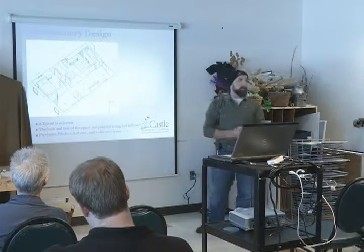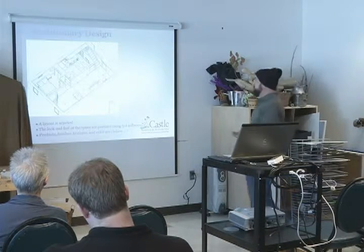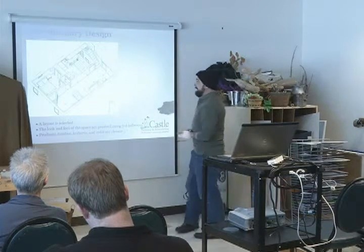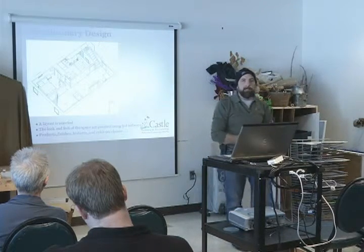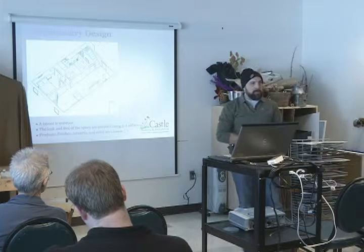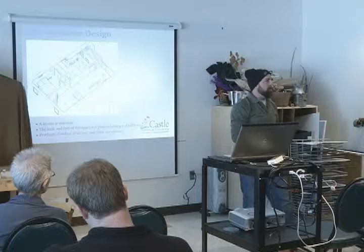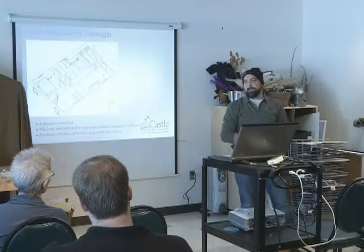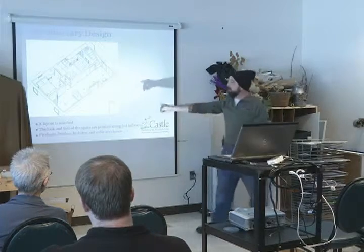Communicating with your city about egress windows is critical. I have had a few situations where it was an office, so it was just a doorway into a room. Didn't have a closet in there. And this was in St. Paul, but they called it a bedroom and we had to fight about whether or not they wanted to make the homeowners pay $3,000 for another egress. They already had one in the other room. So that's the tricky one.